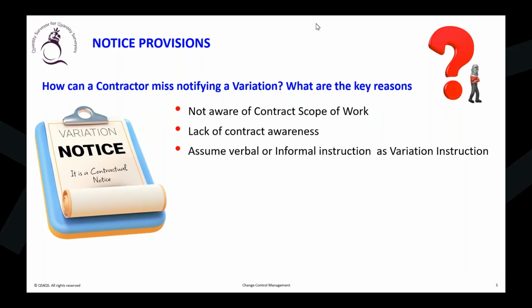You think that is a proper instruction. You should have an idea. In the FIDIC, only the engineer can issue an instruction. Think about your contract, who can issue an instruction. The variation can be initiated by any party, either employer, contractor, or even the engineer. But the instruction must come from one party, that is the engineer.